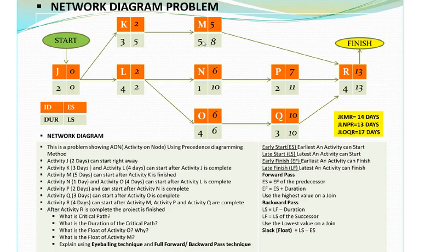You see what happened there? If this changes to 10 days, which is 5 more days, then this will be 14 plus 5, correct? So that'll be 19 days. When that happens, this one is no longer your critical path. So the critical path is going to be JKMR. Why? Because it has the maximum number of days when you add it all up. So make sure to watch out for questions like that.